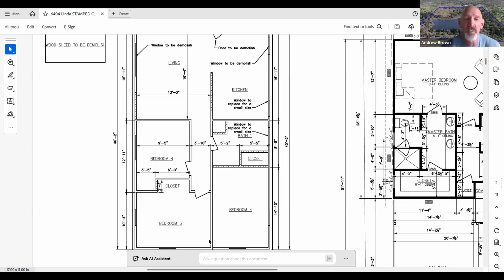It's very different. And so at any house you go to, the first thing I would do after looking around the inside, calculating the square footage, and drawing out how it is now, is ask: can we keep it as is, or just tweak it a little so we're not spending a ton of money for a marginal gain? What are the options? The first thing is to go up inside the attic and see, can we open this thing up? On this house, if we wanted to, we could open it up pretty much as we wanted. So that's an important thing to know. Always keep that in mind. In this case, it was pretty simple.